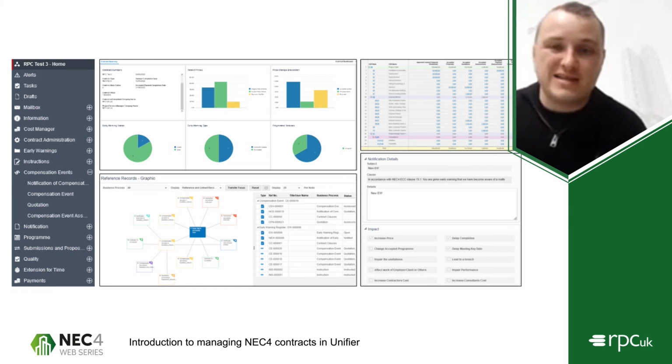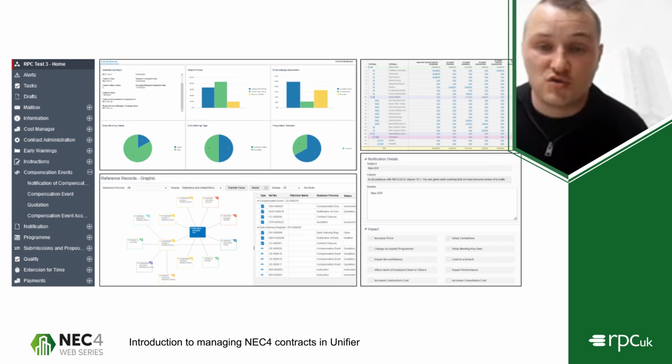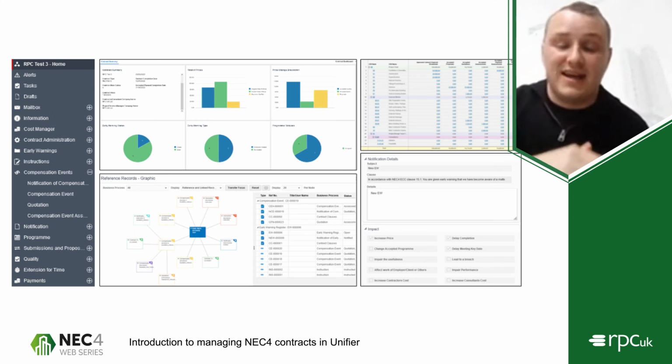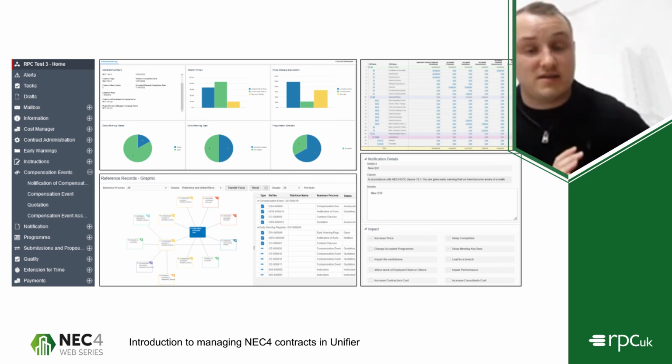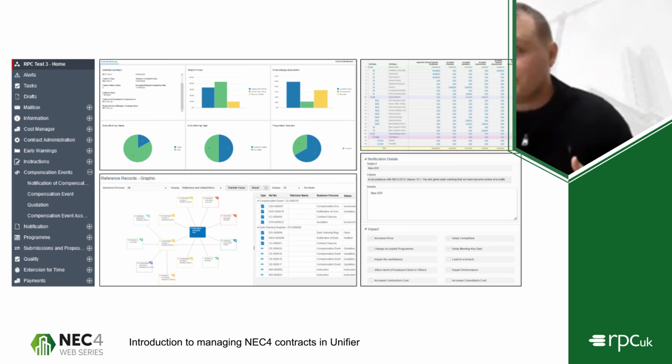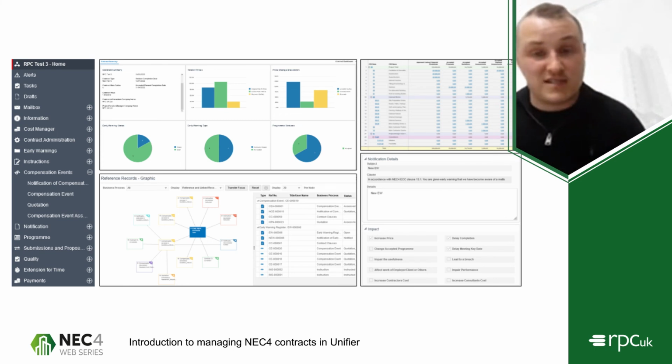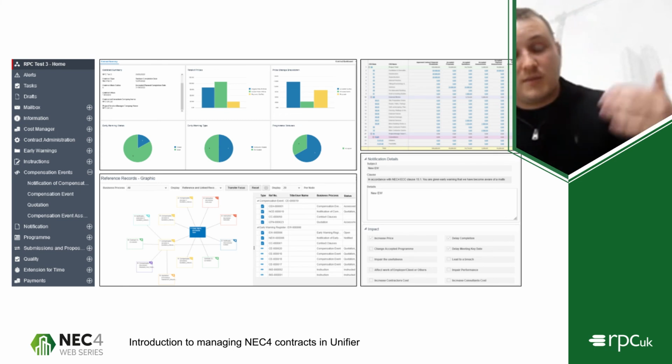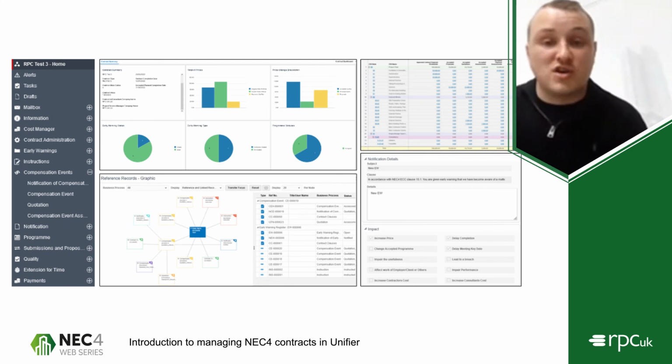So every single item in terms of cost that is brought into the contract is then connected back to the appropriate CBS item in our cost sheet. And as I said, because we've got a standardized version of this between our hierarchies, once you allocate the cost at a contract level, that is going to flow up to the project level above, and then that can flow up to the portfolio level.